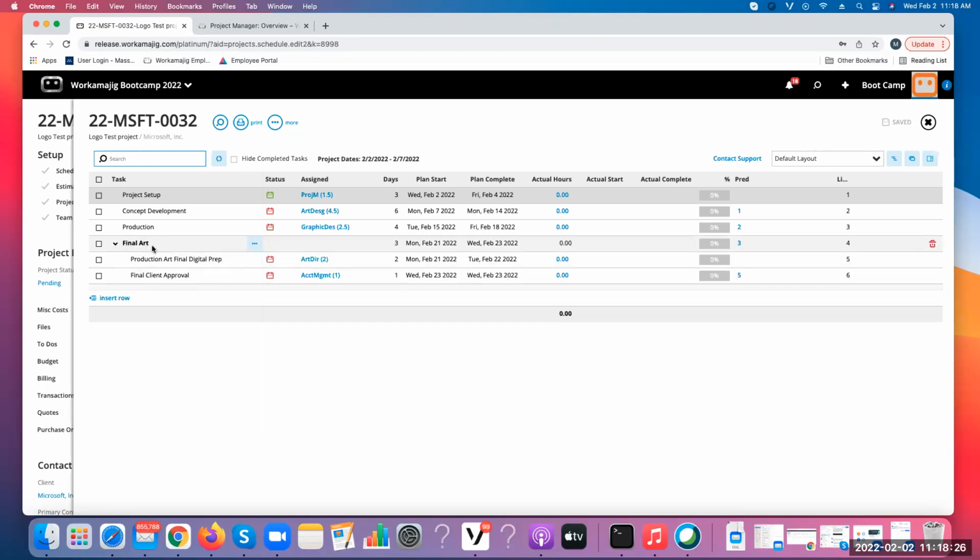You can't traffic this task. You really can't do anything with the task that's the roll-up task. It's these tasks that you would be actioning, so assigning folks, having them put time. And sometimes I'll see a roll-up task and all the people will be assigned, and then the system won't even let you assign anybody to the detail task.